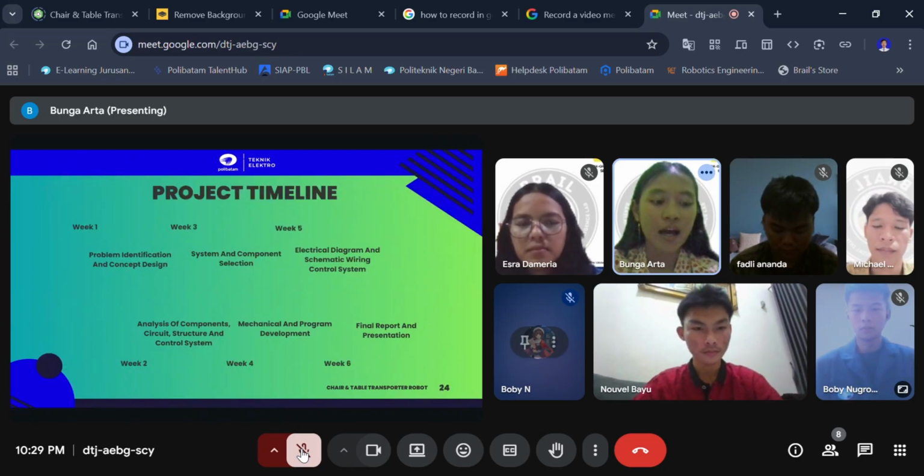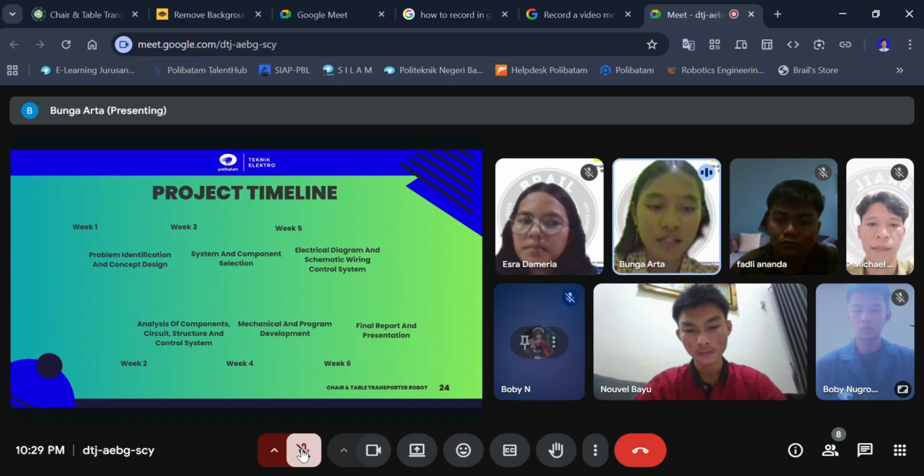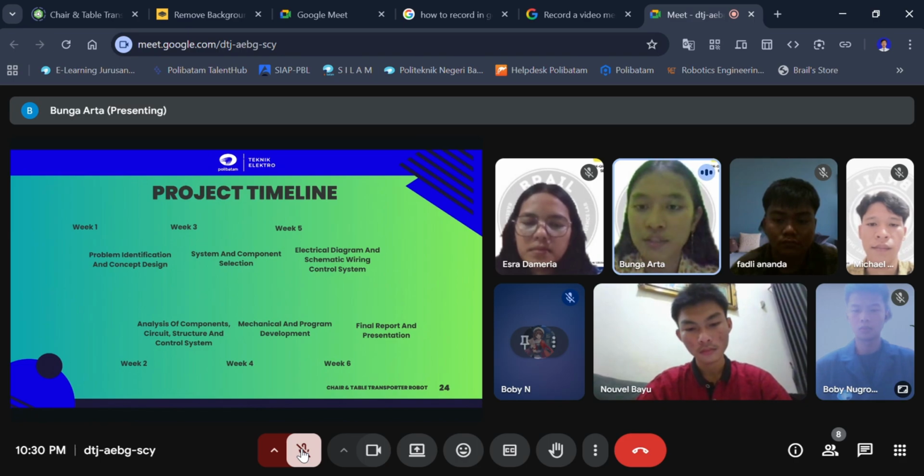Okay, next, I will discuss the project timeline. We need 6 weeks to complete this project. First week, problem identification and concept design. Second week, analysis of components, circuit, structure, and control system. Third week, system and component selection. Fourth week, mechanical and program development. Fifth week, electrical diagram and schematic wiring control system. And sixth week, final report and presentation.